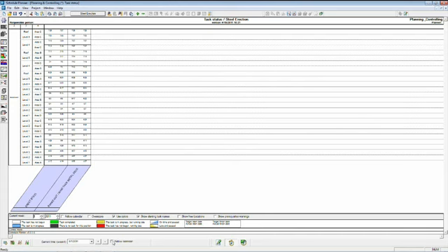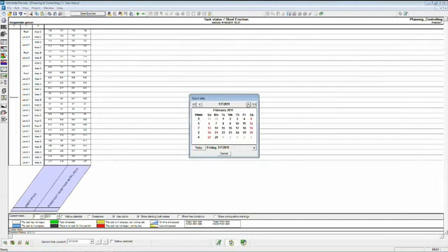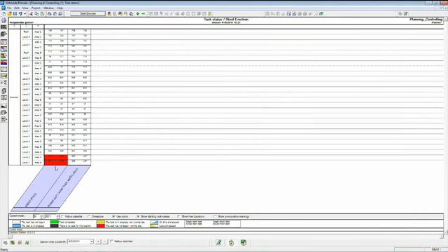If we set our date to, let's say, a week later, it's now April 22nd, and nothing has happened. This is represented in our control chart by a red box at that location, meaning the task has not begun and is running late. Again, it's the 22nd. We're supposed to have started on the 15th. We're supposed to have been finished with level 2 steel on April 22nd. And so we have these red boxes here.